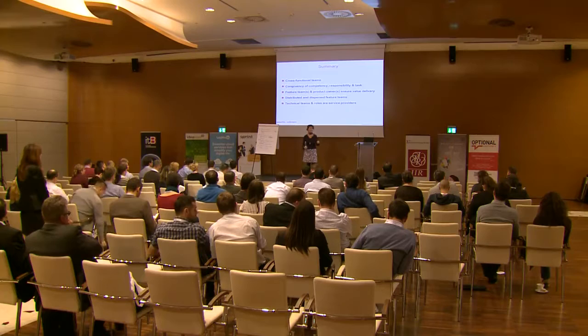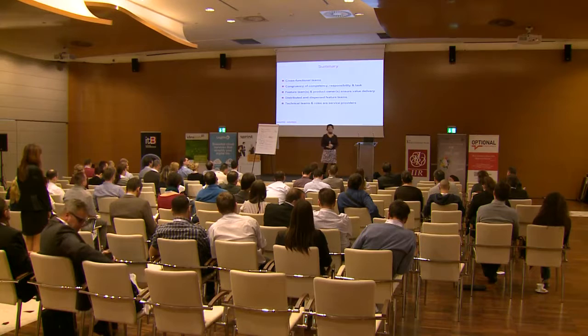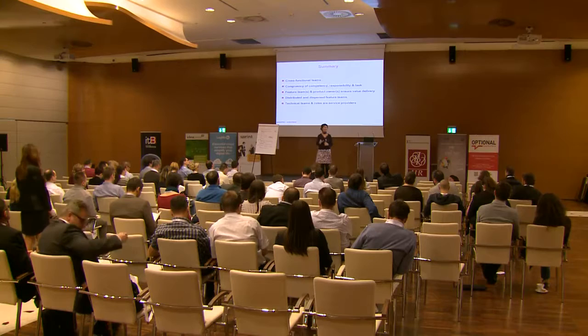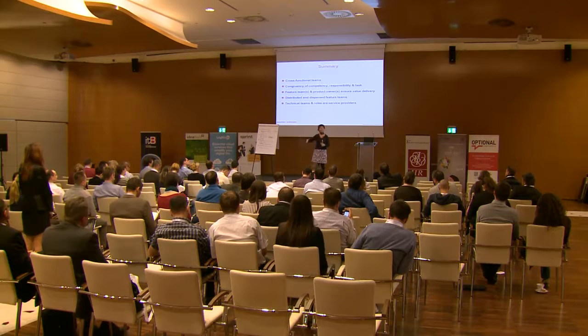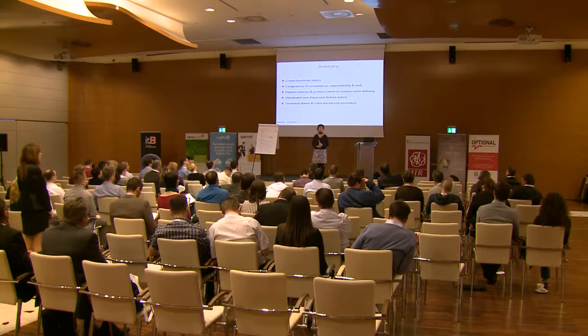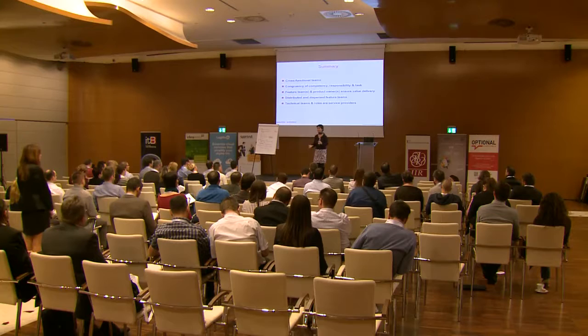So how much does it distract? As a start of taking turns, I always calculate with something like 30% of that person's time, so that the availability put into the iteration would be 30% less than normally he would put in. So I even have this kind of number, and again, after a while it should go down even further. However, I never so far have seen a team really saying, okay, we don't need that role at all because we are completely self-organizing here. I haven't seen that. But maybe we get there.